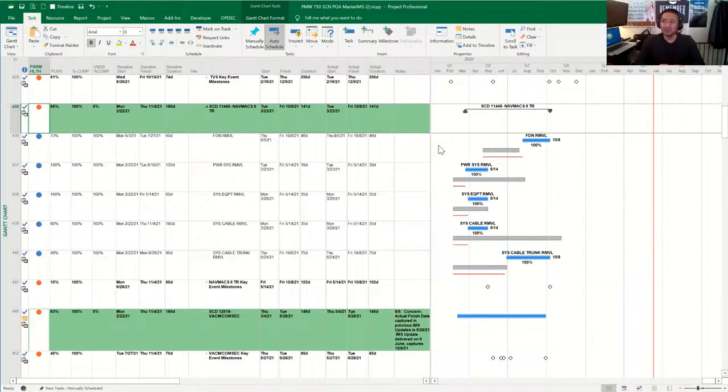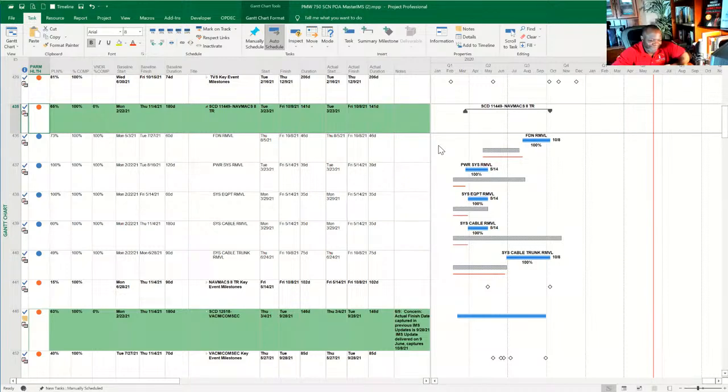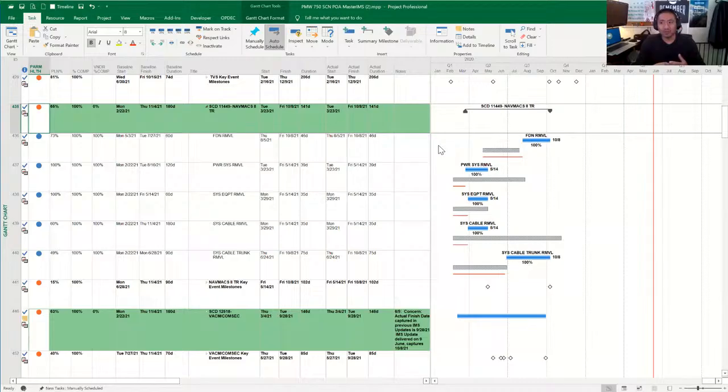So, to not open up any cans of worms, the critical negative slack, or the float, is like a bank account. You're negative, you're using your overdraft, saying you're over negative $100 and waiting for your next paycheck to hit so it can clear. So the critical negative float is used to help in trying to get the schedule back on track.